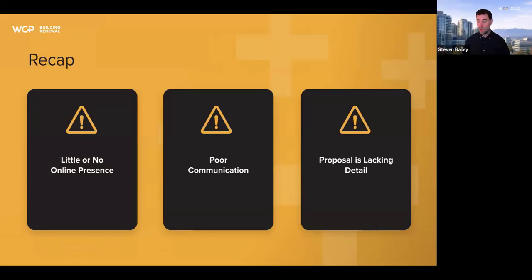We've seen situations where a contractor came in with a very low number. It happens, right? But the proposal was light on details. So on paper, it looks attractive. But then once the project starts, you start to notice gaps in the scope quickly turn into extra costs. That means frustration, and it leads to hard discussions that you have to have. So over time, we've learned that clarity upfront, especially in communication and documentation, is going to be one of the best predictors for how smoothly a project is going to run. I'd also say, red flags don't always mean a contractor is wrong. But when these signals happen, it's just worth slowing down and asking a couple more questions.